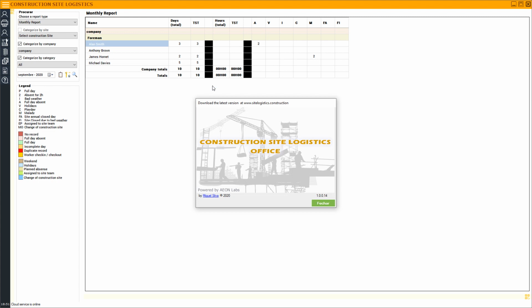As the day passes, a worker can log into the system at any time any difficulty, problem, or non-conformity, and when the work is completed, simply mark it as done on the app and move to the next assigned task. This will allow the technical staff to assist more rapidly when things don't go according to what was planned, propose solutions, and act faster with a live report at hand, pre-filled with worker comments, photos or videos explaining the situation, or simply have a real-time overview of how the progress of works is going at the construction site, any delays, identify more easily unforeseen situations, or even update the work tasks for the following day with new tasks previously not identified in the execution project.